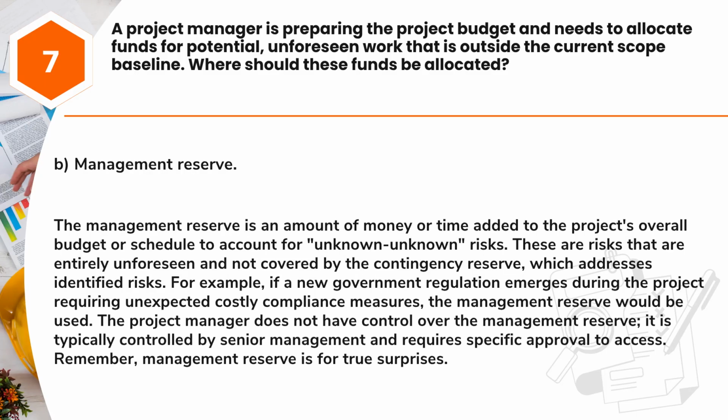Answer: B. Management reserve. The management reserve is an amount of money or time added to the project's overall budget or schedule to account for unknown risks. These are risks that are entirely unforeseen and not covered by the contingency reserve, which addresses identified risks. For example, if a new government regulation emerges during the project requiring unexpected costly compliance measures, the management reserve would be used. The project manager does not have control over the management reserve. It is typically controlled by senior management and requires specific approval to access. Remember, management reserve is for true surprises.